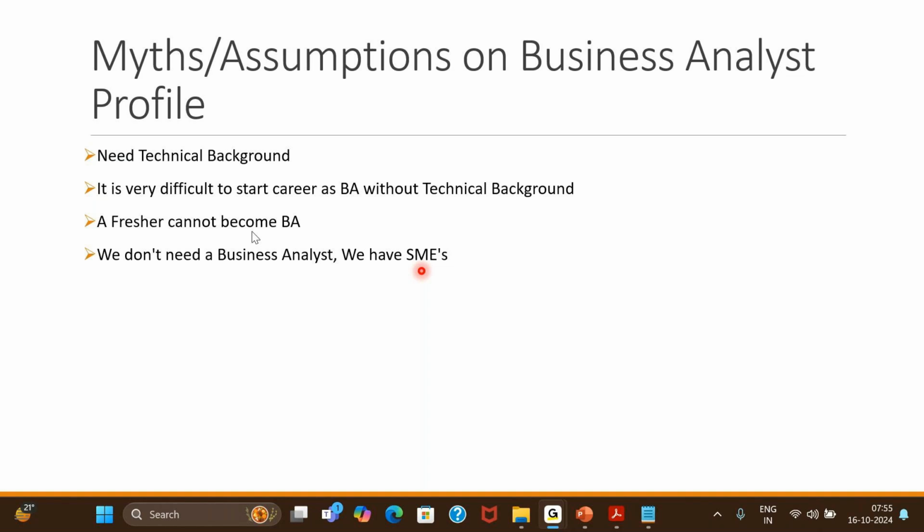Nowadays, with everyone moving into Scrum, the ideal size of a Scrum team should not be more than 5 to 7 people. If I take 2 developers, 2 QA, one Scrum Master, that leaves me with one BA only.